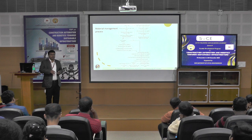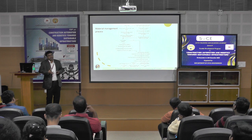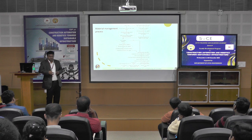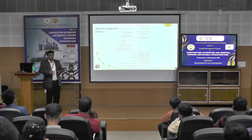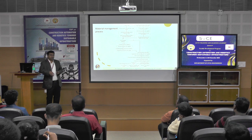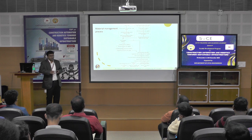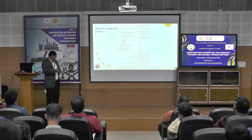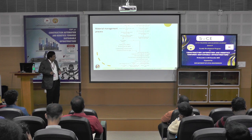After inspection, a Material Receipt Note, or MRN, is generated. MRN indicates that you have accepted the quality of materials and need to pay the supplier. The materials are now part of the project's inventory, and payment is made to the supplier based on the MRN quantity.